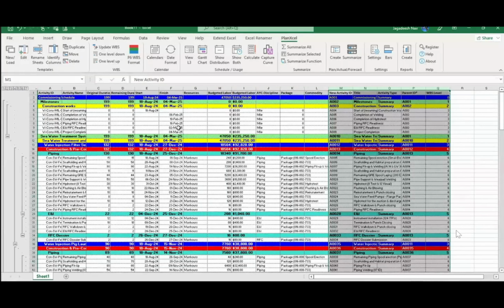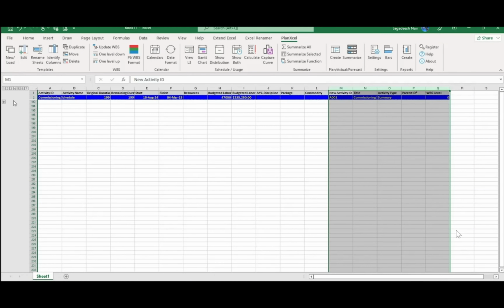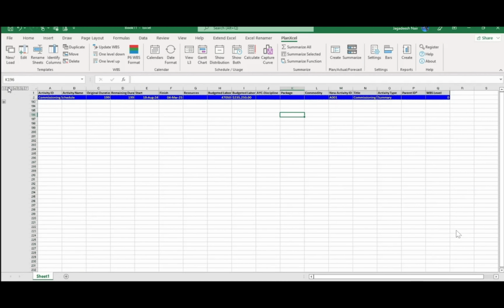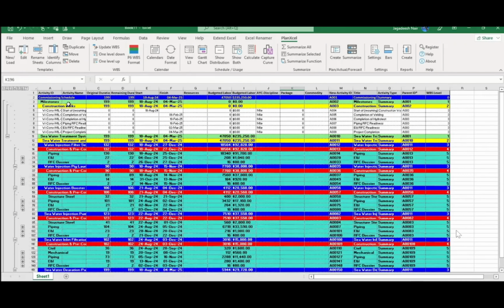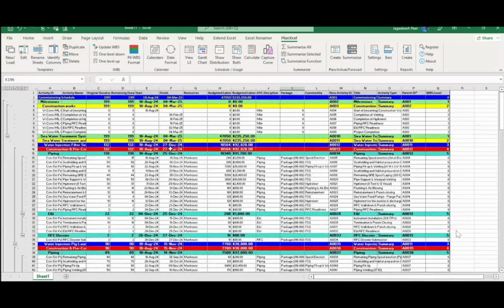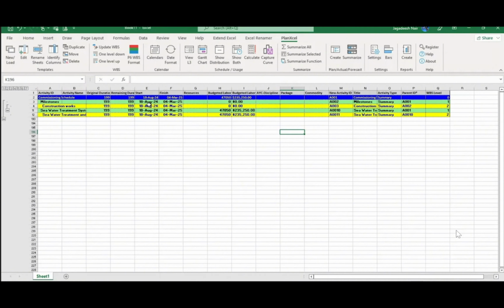What happened now is that there is grouping also added. For example, if I want to see level 1, this is the level 1 schedule, then level 2, level 3, level 4, level 5, level 6, and level 7. This is the last one. This way, if you are giving it to any construction engineer, it's very easy for him to drill down to see which level his activities are and to perform based on that. And we can add the quantitative hours and all the things on to it. That is an additional add-on. But from the schedule point of view, to identify what his scope is and what he has to look into, this method is helpful.